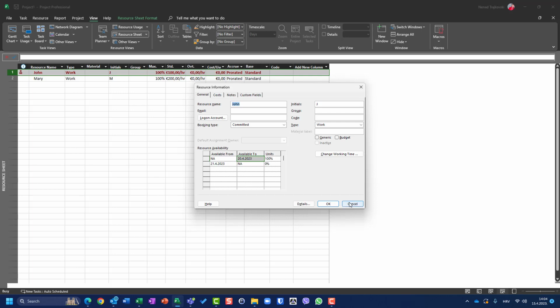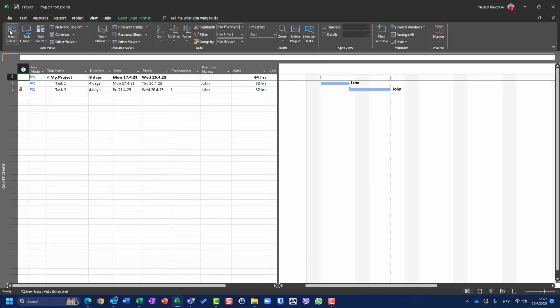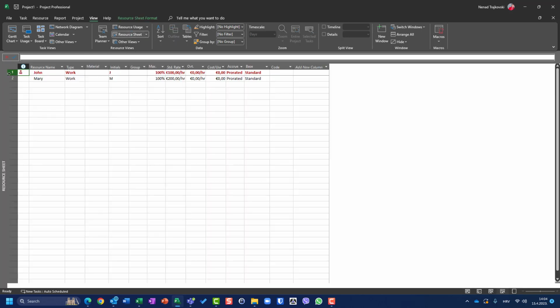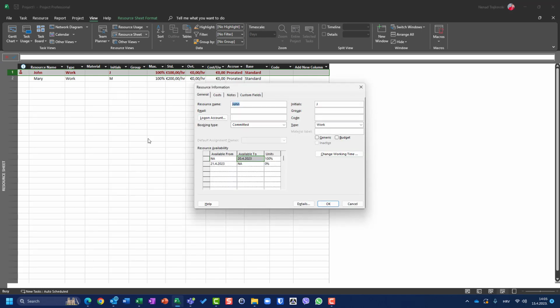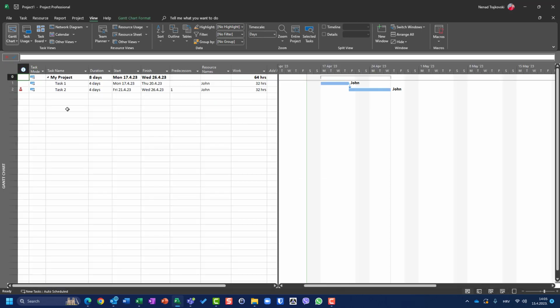So to conclude the story, never ever remove a resource. If a resource should be available in some period and not at another, then make this resource unavailable in that specific period, like I did here. Open it from 21st of April to the end of the world. And don't forget, there are two approaches.